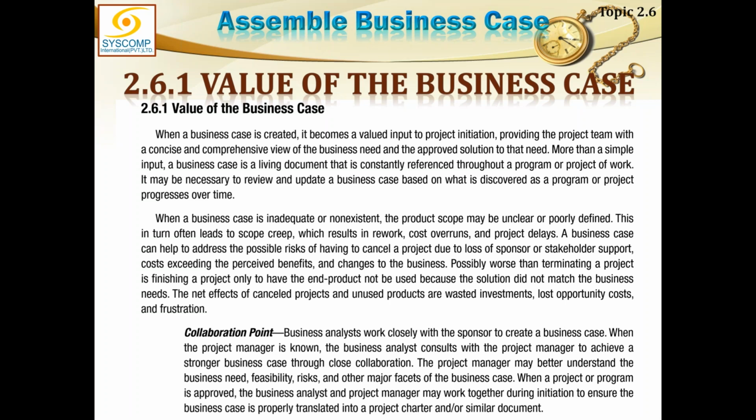I give an example very often, that you have constructed a school on funding from maybe some international body, and you are very happy the project is successful, but that school never goes into operation. You never hire staff for that school, you never organize it, you never enroll students for it. So what is the fun of making the school? So this project is useless. It is better that this was cancelled earlier at the stage of the business case, rather than constructing the whole thing and then it proves to be useless.